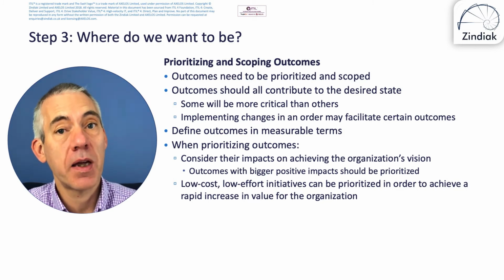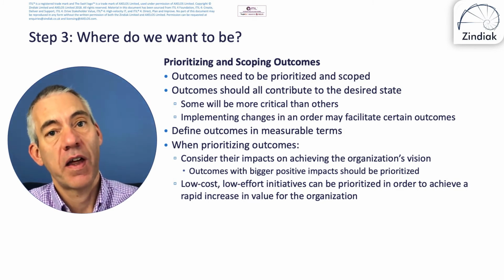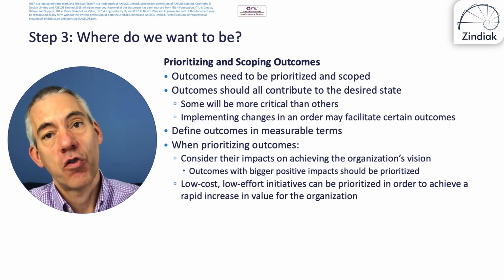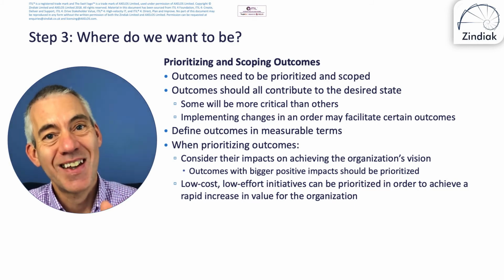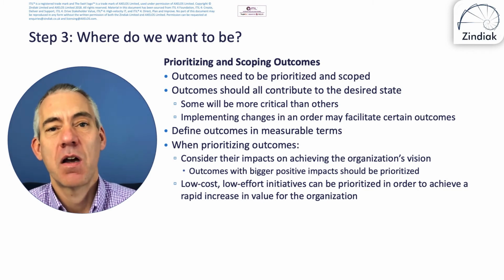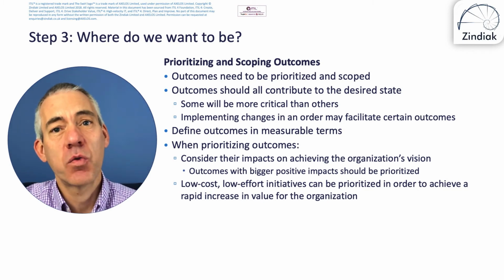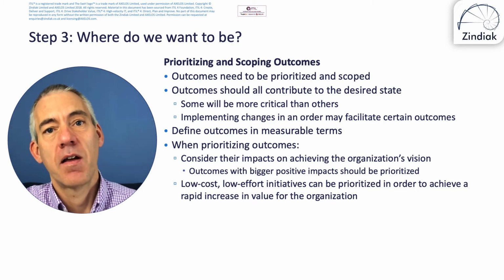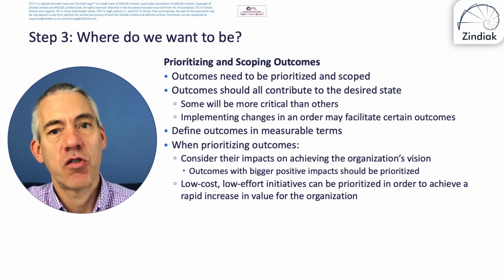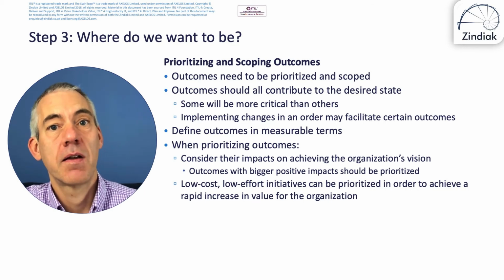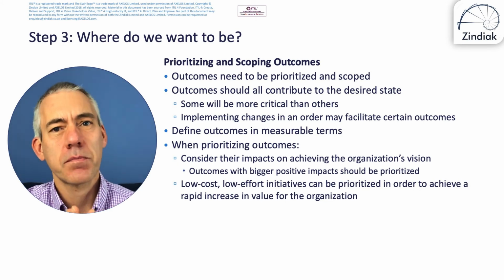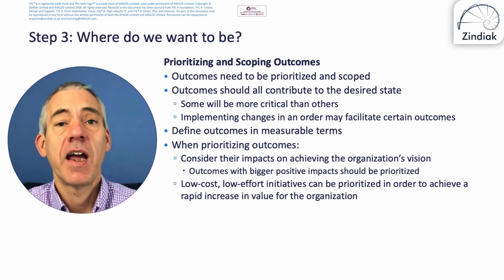So there may be something on the overall initiative backlog that's a must-have, but in this step, it's only a should-have or a could-have. So in other words, this is a must-have by the end of the year, but it's only a should-have or a could-have in January, because as long as we've got it by September, it's fine. In simple terms, so they are different.